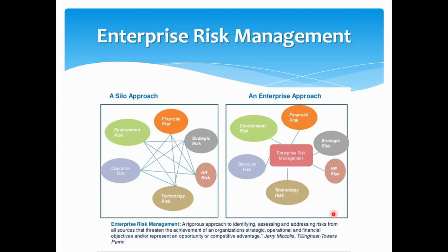Every moment this risk landscape is changing for an enterprise. So as a project manager under technology, even in my organization, the key project risks come first in the technology risk sheets, and that goes into the enterprise risk sheet. If you're in a core banking implementation project, and there's a risk of the project getting delayed, when you put it into the enterprise risk management framework, sometimes it will rank as a very high risk, because maybe we need the core banking upgrade